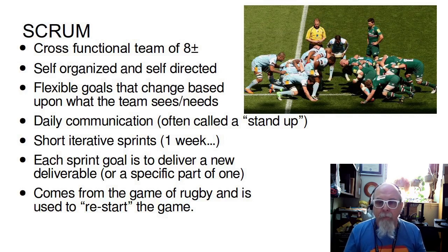Usually in a Scrum development group, there's a daily meeting, about 15 minutes, called the daily stand-up, where all the team members get together in a room or in a virtual chat channel face-to-face, where they can talk about what they did yesterday, what they're going to do today, obstacles, and ask for help if they're having problems. That way other team members in their cross-functional team can give them some direction and maybe tell them, oh, I've already solved that problem over here. We'll talk offline, or we'll get together later.